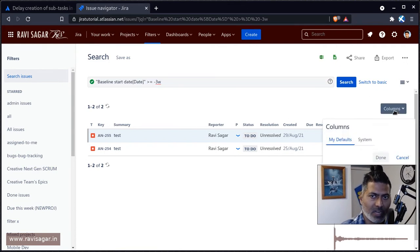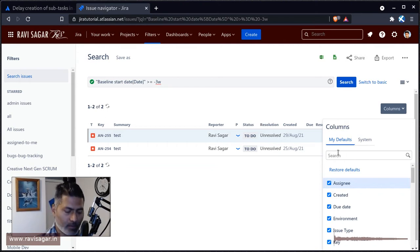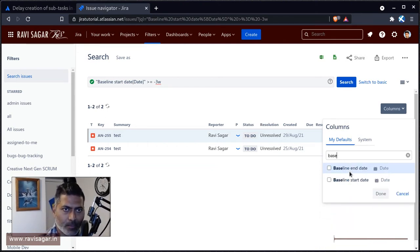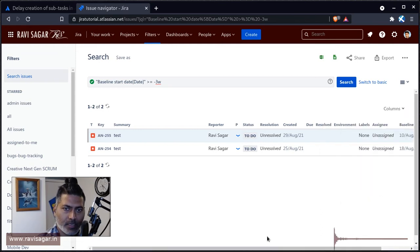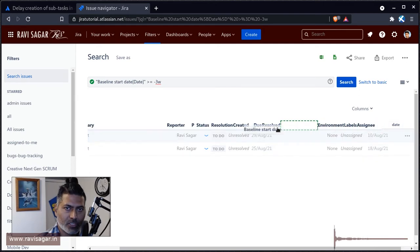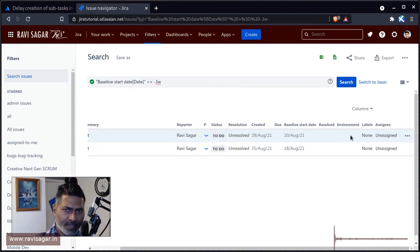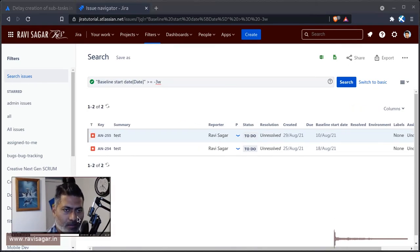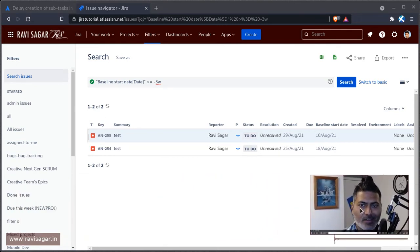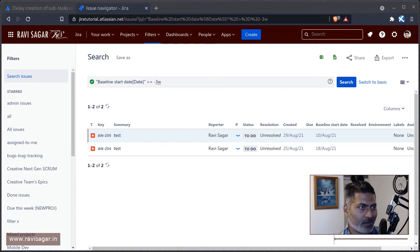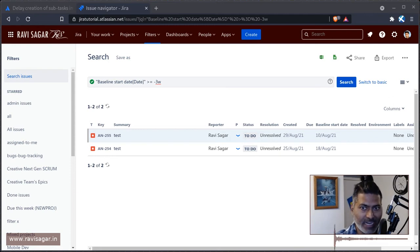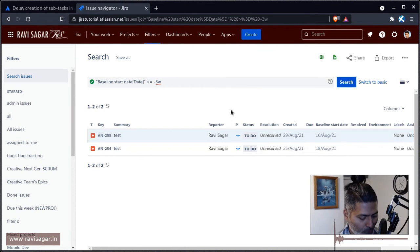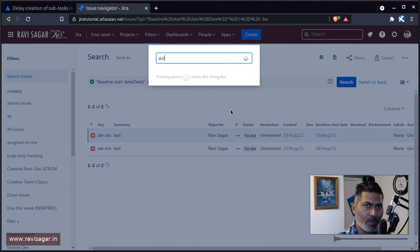Basically, this JQL will give me issues with baseline start date that is in the past three weeks. I can also validate this if I show you this particular field in the results here. We can see here that we have baseline start date, which is in the month of August, in the last three weeks. Whenever you run this JQL, it will check for baseline start date in the last three weeks from that particular date. Right now, this date is today's date, so when I'm running this today, but when you do it from the scheduler, it will look for the same thing.